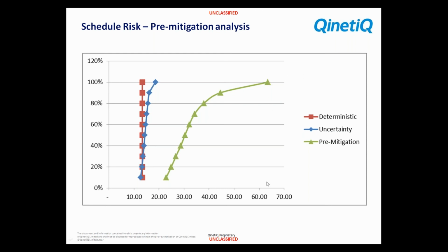Similarly, if we give him something like 65 days, then he'd be a very happy person, because at 65 days there are no potential outcomes greater than 65. He would have 100% confidence that it didn't matter what risks matured, what risks were triggered. He would have enough time to correct them, mitigate those risks and put them right.